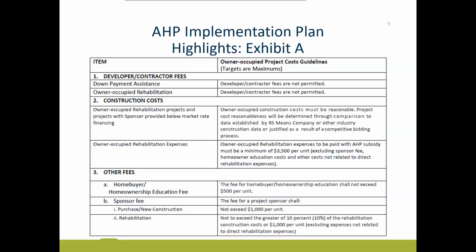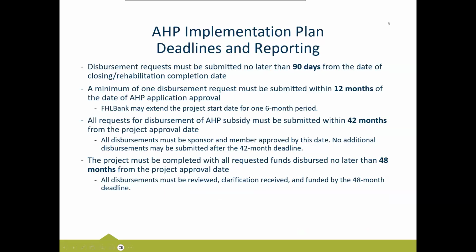All right. Couple of things on deadlines and reporting. We're going to start with deadlines. Disbursement requests must be submitted no later than 90 days from completion date.